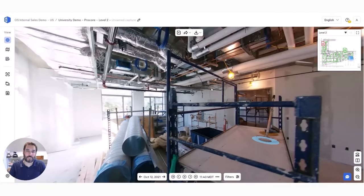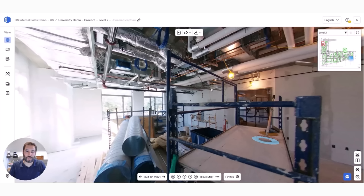What we do is record 360 video at two frames per second, so every half second we're capturing a 360 image. At the end of your walk, you hit stop, upload to OpenSpace, and within 25 minutes your images are ready to view.